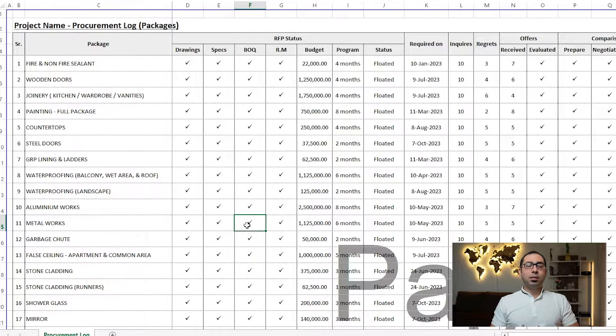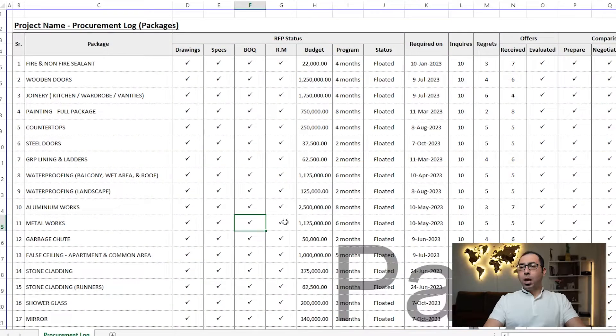I always prefer to send the BOQ as part of your RFP, because when you send a BOQ, people will try to quote as per your BOQ. If something is missing they will add it, but in the end the offers you receive will be on the same BOQ and will be very similar to each other, so you can compare them easily. The BOQ is an important part of the RFP.